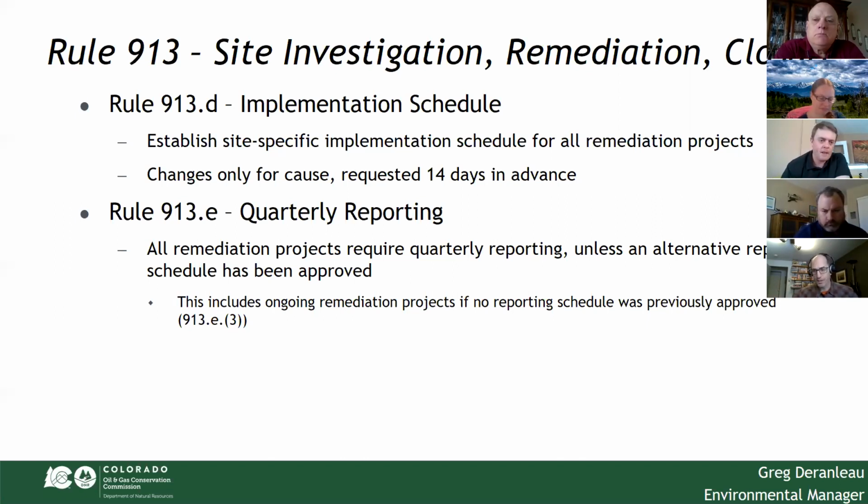913E establishes a quarterly reporting schedule for all remediation projects, unless an alternative is approved by the director. So this does include ongoing remediation projects if there was no prior approval of an alternate reporting schedule. On some of those, that'll just be a simple Form 27 submittal that bumps an update to staff.